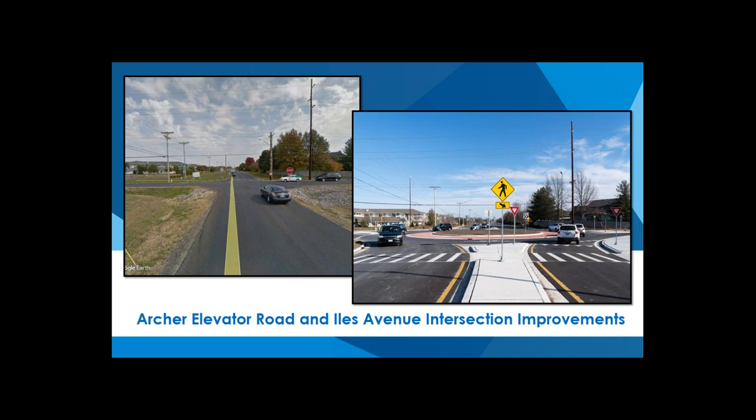Okay, what is the cost difference for the actual roundabout relative to a conventional intersection? I believe I addressed that earlier, as far as we did review both the cost of the traditional signalized intersection and a roundabout at this location. And I don't think I mentioned that, but signals were warranted at this location. So it would not have been a four-way stop in the proposed condition. That was the existing condition, but signals were warranted.